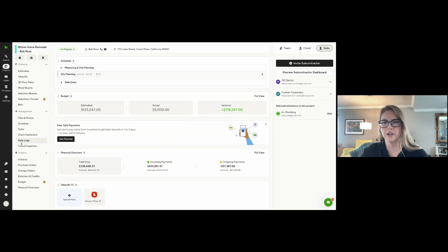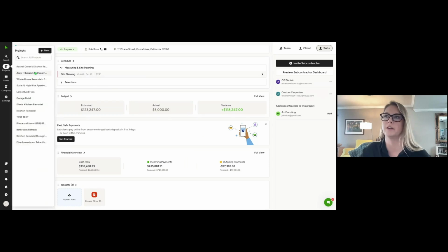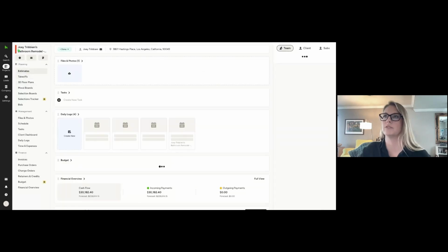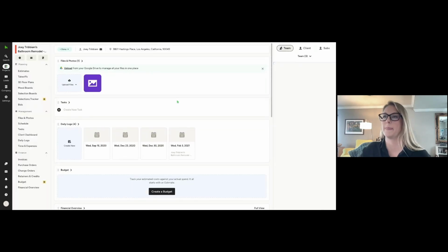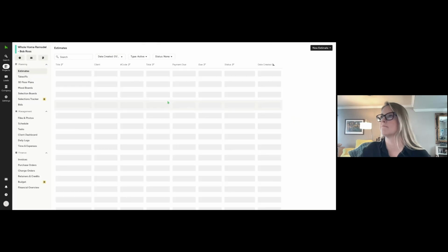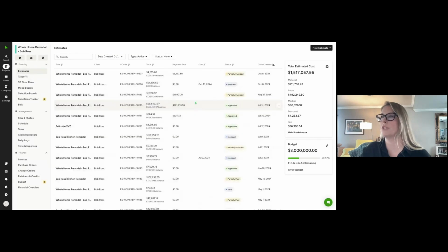And I saw, Richard, your other question about whether you should create a PO. The recommended document flow help article that I shared earlier is a great resource because it also talks about purchase orders, but purchase orders are up to you. I know a lot of our design community uses them more often, but from an estimate, let's go back to that project. And you want to make sure your estimate is approved first before you move forward with a PO.